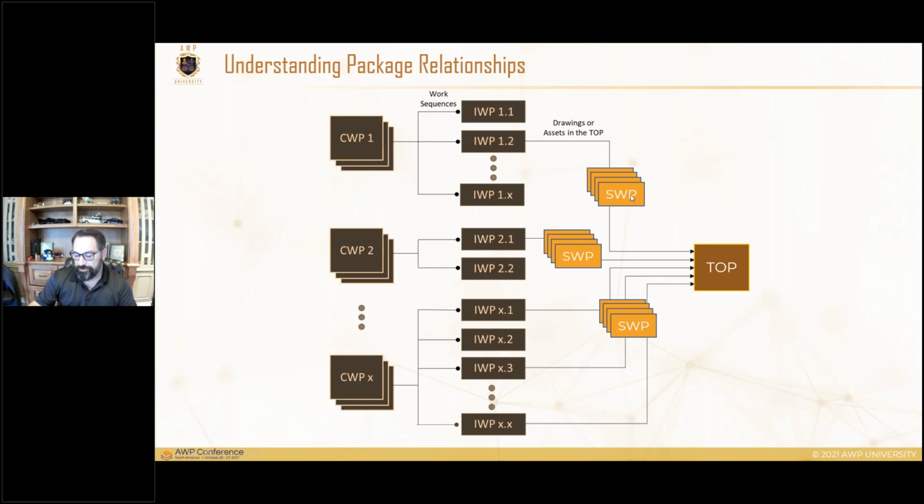The IWPs are tied to the SWP, and the SWPs roll up to the turnover system. So this is showing the linear relationship to actual completion for that turnover package. So multiple SWPs from multiple sources would make that turnover package. So there again, it's a web of data assignment tied to these aspects and the execution of them.